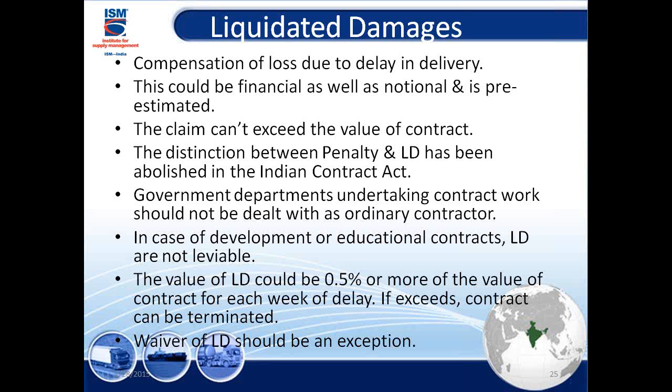The liquidated damages, in short I'm calling LD, could be 0.5% per week. And this could change every week around, so 2 weeks means it becomes 1%. When it comes to 10%, you could terminate the contract. Now, waiver of liquidated damage is an exception. Keep that factor in mind.